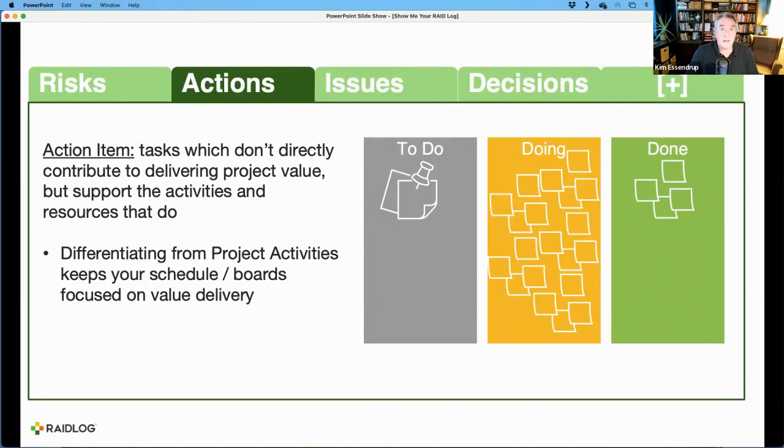And if your project plan is under change control, that would be kind of a nightmare if all the action items out of every meeting result in a change control to your project schedule. So we don't want to go there. Now, there are important things that you need to stay on top of. And I'd say they don't belong in your plan because they're not going to be on a critical path. They're not directly contributing to the project, but you still have to do them. And so how do you track them?